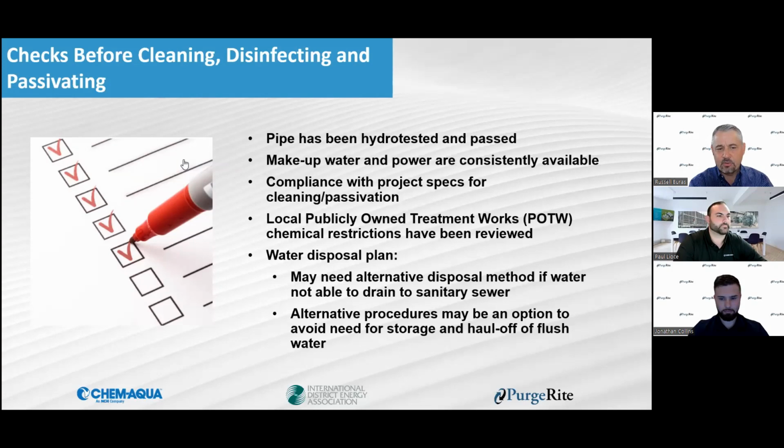You want to be in compliance with the specifications. What that can mean is, as you look at some of the technical parameters in your specifications, typically found in Division 23 specs, there'll be certain flow rates that they're desiring to have done.